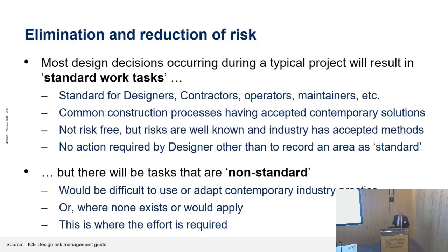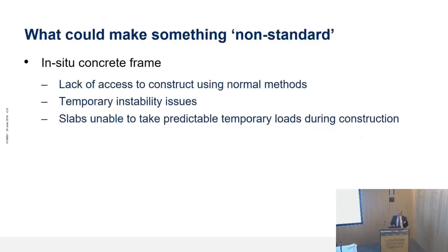The other half is that there will be non-standard elements — those that will be difficult to adopt practice for, or where none exists. That's really where the CDM effort needs to be put. What would make something non-standard? Consider the in-situ concrete frame example: a standard frame on a greenfield site, no problem. But if there's lack of access to construct it using normal methods, or temporary instability issues — for instance, cantilever slabs needing extra propping, or slabs unable to take predictable temporary loads during construction perhaps because they're relatively thin — these are the sorts of things that make it non-standard and the contractor would need to be informed.